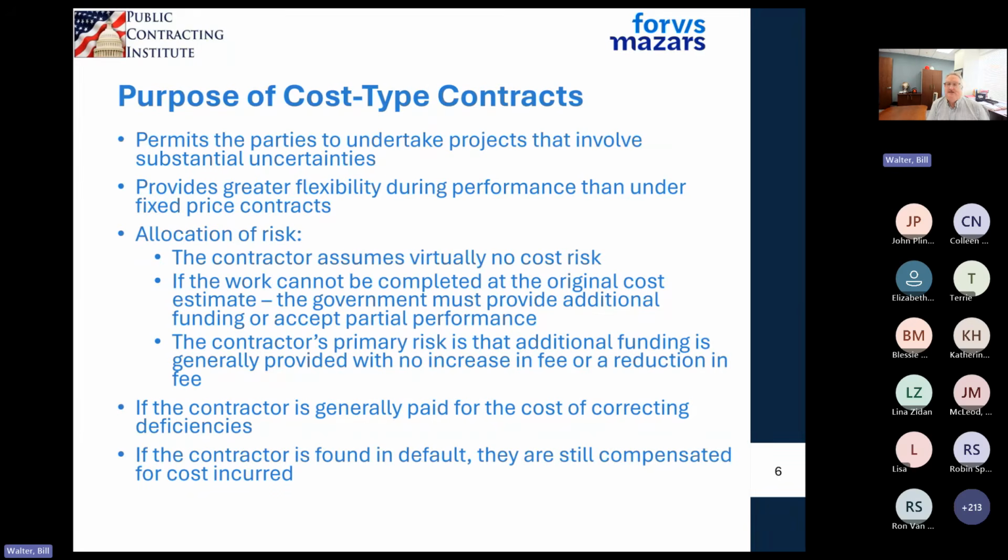Doesn't mean they will. I've seen a lot of contracts that have come out on a fixed price basis and a number of contractors willing to bid on the work. And it's like going to Las Vegas, man. They're sitting there, hoping that a lot of these risks don't come about, and they're bidding this work on fixed price. And when they win it, I've seen companies that have done really well, but I've seen other companies that come in with a lot of changes to the contract because they say, oh, it took more hours than we thought. And a lot of the government people are saying, too bad, this is a fixed price contract. We didn't tell you how many machines needed to be repaired or how frequently. We just said, here's a listing of all the machines we have, and we want you to provide the maintenance on it.